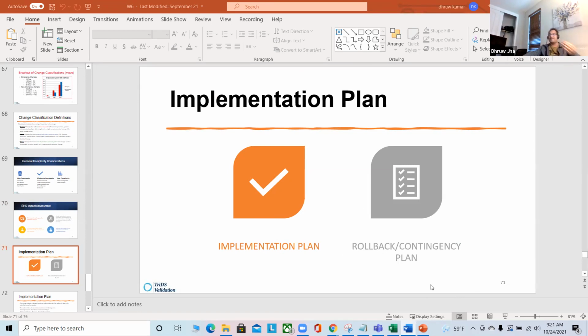So if you do the change and it's going to create another problem, you should have a rollback plan, so that in those cases, I'm just going to roll back. I'm not going to do this change. I have to go and fix it first, because it's affecting another thing. So you see, this is how it works in the engineering world, you have to make sure everything is planned.